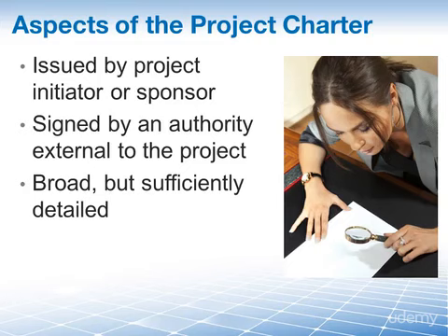It is not considered a contract. There is no consideration, which is the benefit that each party gets or expects to get from a contract. That is money or promise thereof in exchange for the obligation performed to do the work. So really it is not a contract.